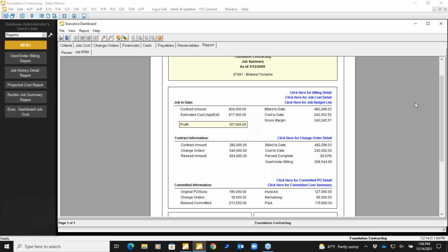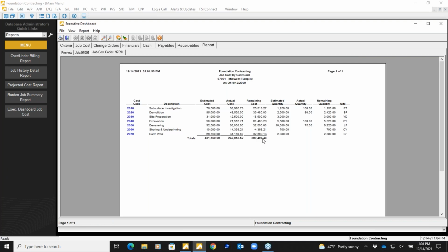So, another important thing that a business should be looking at is not just the job itself as a whole, but also being able to look at estimate versus actual by cost code. So we have a ton of clients that want to take things a step further. They want an ability to set the job up with different line items of cost codes that they want to track. And this also might be where third-party estimating comes into play.